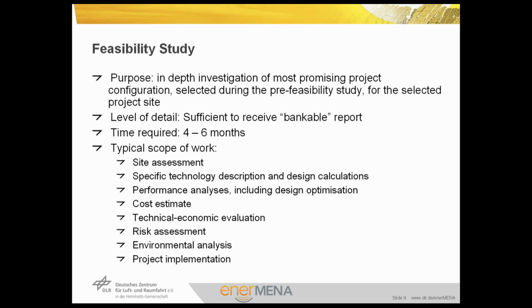The performance analysis, including design optimization, will be done again. The better your solar data are, the better your economics will finally be. Herewith, you can better evaluate the risks of your project. The cost estimate should be done also in this study. Often, EPCs will be asked for quotations. What would be the rough price or the capex for the procurement of such a project? Depending on the level of details, you would speak, for example, with suppliers of steam turbines.